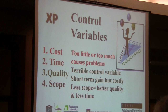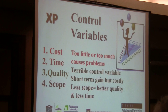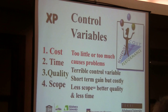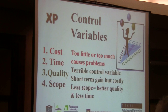The key is the scope: less scope equals better quality and less time. So if you have a project, reduce it down to its minimum of what you need. Build that, and then you've got something that works. Then add the other things on — build the scope on after that.